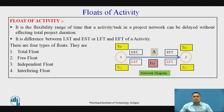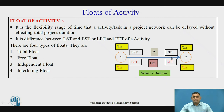Now let's see the floats of the activities. Float is the flexibility range of time available with the activity by which a particular activity can be delayed without affecting the overall project duration. It is the difference between the activity times — the latest starting time and the earliest starting time, and the latest finishing time and the earliest finishing time.